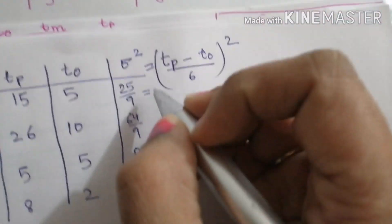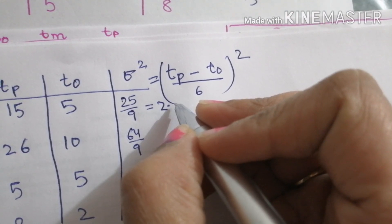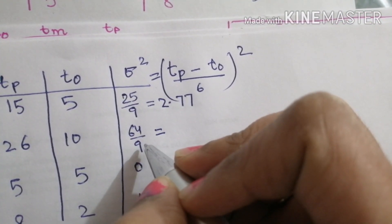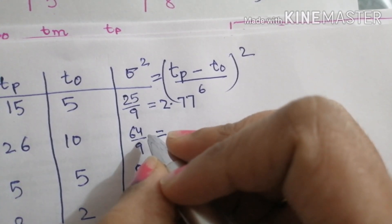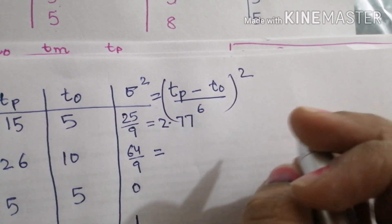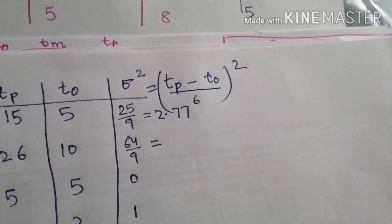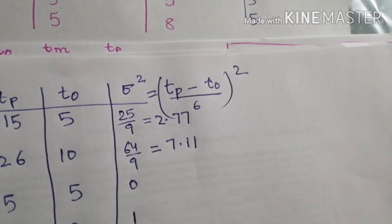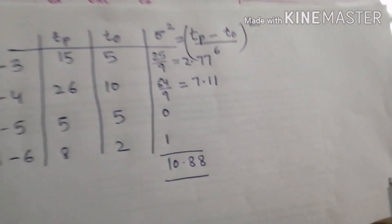Calculating variance using (Tp minus T0)/6 whole squared: for 1-3, (15-5)/6 = 10/6 = 5/3, squared gives 25/9 ≈ 2.78. For 3-4, (26-10)/6 = 16/6 = 8/3, squared gives 64/9 ≈ 7.11. For 4-5, (5-5)/6 = 0, variance is 0. For 5-6, (8-2)/6 = 1, variance is 1. The total sigma squared for the critical path is approximately 2.78 + 7.11 + 0 + 1 = 10.88.